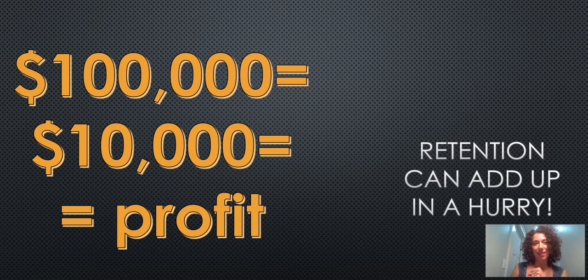Now, that doesn't seem like too big of a deal whenever it's $100, but whenever that job is even just $100,000, you can see that that can add up. For many of our contractors, the 10% profit on a job is normal. That means the entire gross profit for the job is held until the job is completely done. This is one of the main reasons that cash flow is so tough for contractors, because with that retention, if it's sitting at 10%, we can hold up our profit through the whole end of the job.